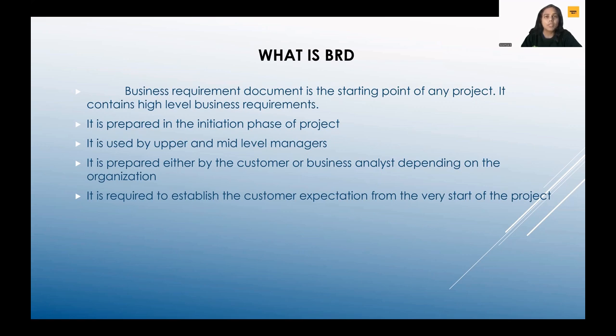After gathering the objectives or requirements from business stakeholders, a formal report is prepared in the form of a BRD. It provides clarity, retains focus, and removes ambiguity about project needs. That is why normally it should be prepared in the initiation phase of the project. It is prepared by upper and mid-level managers.